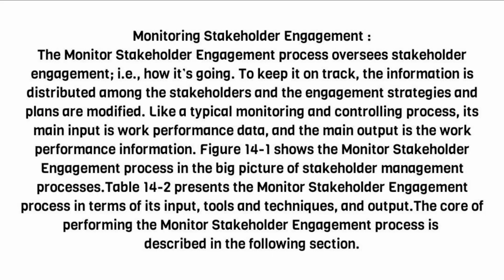Monitoring stakeholder engagement. The monitor stakeholder engagement process oversees stakeholder engagement, i.e., how it's going. To keep it on track, the information is distributed among the stakeholders and the engagement strategies and plans are modified. Like a typical monitoring and controlling process, its main input is work performance data, and the main output is the work performance information.